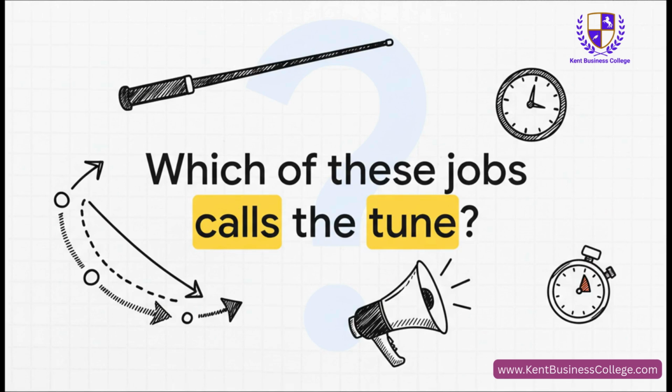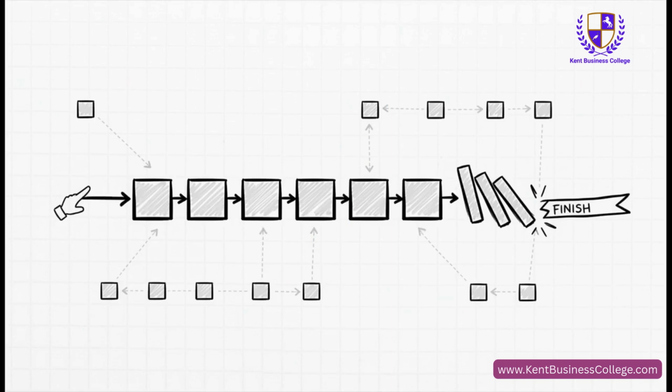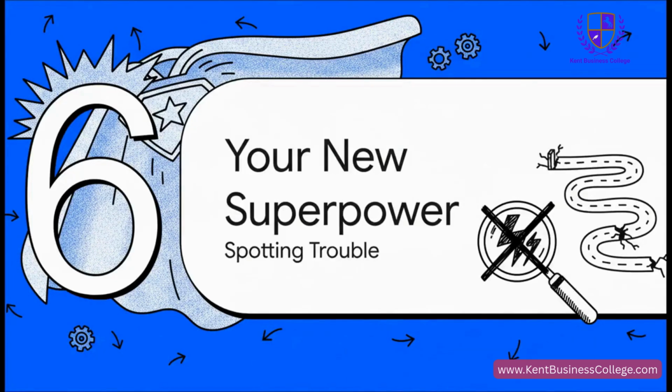So looking at our completed table, which of these jobs are the ones that really run the show? Which ones, as we sometimes say in the business, are the ones that call the tune? Well, it's the ones with 0 float, of course. Our critical path is survey, then design, ordering the items, fitting the furniture, snagging, and finally, the grand reopening. Any delay to any one of these tasks will push our finish date back from day 24. These are the jobs you simply cannot let slip. And that's pretty much it.